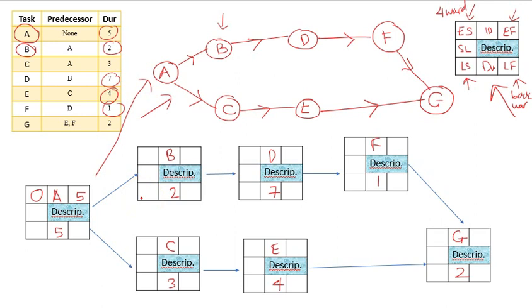Next is to determine what is the ES for B and C. How to do that is we just simply carry the early finish of A to the next activity. So this becomes the early start for B and C, so this is 5 and 5. We can automatically calculate the EF, which is 5 plus 2 is 7, and this is 5 plus 3 is 8.